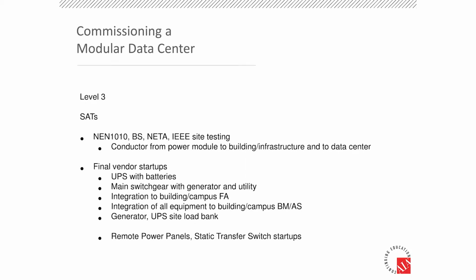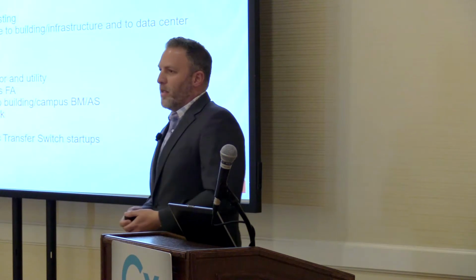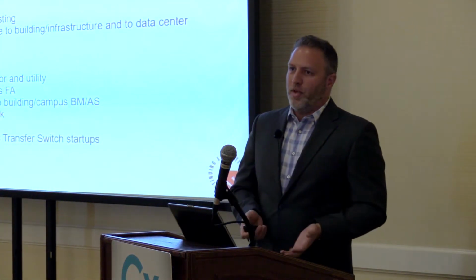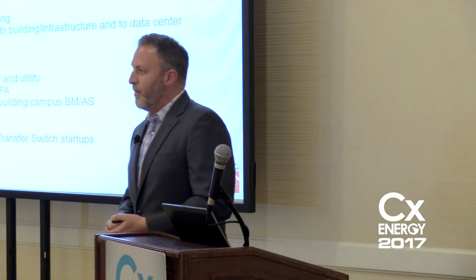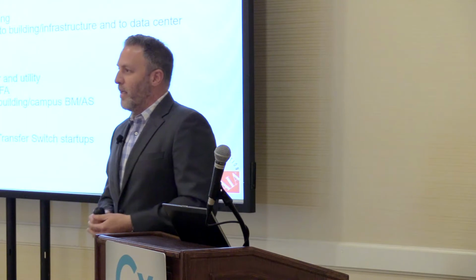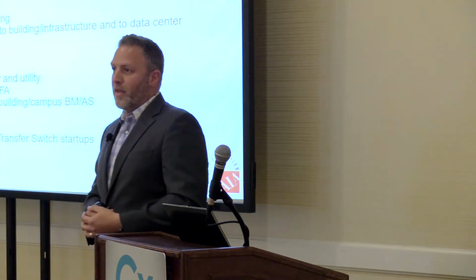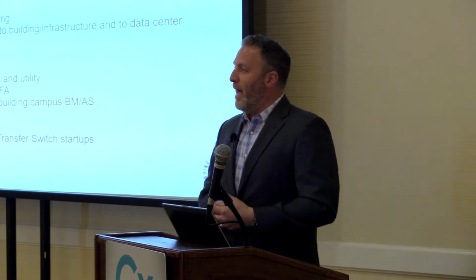So level 3s. Level 3 are your field activities, your site acceptance, your site construction, installation. What are the requirements for site activities? Well, it depends on where you're at. In America, a lot of those relate around NETA. You go to the Netherlands, they're going to revolve around NEN 1010. You go to the British Isles and Ireland, it's going to rotate around the British standard. So you have to understand the requirements. Your client end user also have to understand those requirements, as well as the technology available to the contractors to do that work. Not everyone has a primary current injection test kit that they can just roll up. If we go back to our other photo, there's really no way to get that into the switchgear housing anyway to do that test. So you really need to do it at the factory, if at all.